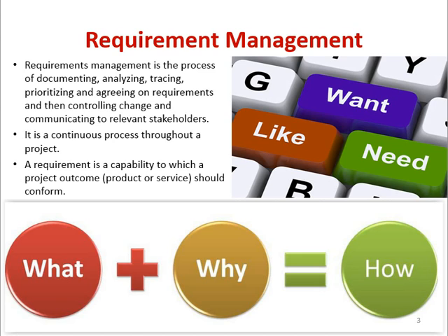So requirement management is a continuous process throughout the project. You can't say that you are done with requirements management. Definitely you can say it, but at a certain level. You can't say at the very beginning of the project that you are done with requirement management, because the requirement might be or definitely will get changed in today's dynamic environment. So a requirement is a capability to which a project outcome, which is a product or might be a service, should conform.